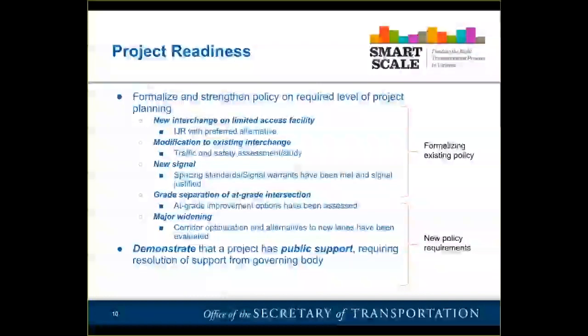And then the final bullet here is a requirement that regardless of who is submitting or who the applicant is, they have a resolution of support from their governing body. So if it's a PDC submitted project, the Planning District Commission has included or uploaded with the application a resolution of support from the PDC. Same from the MPO or from the locality if it's a county or a city.